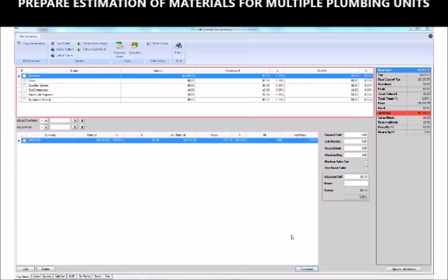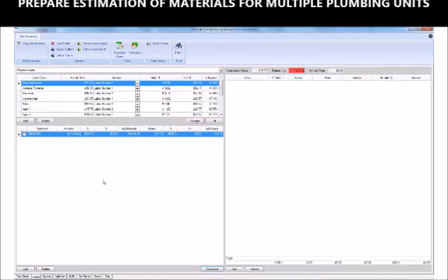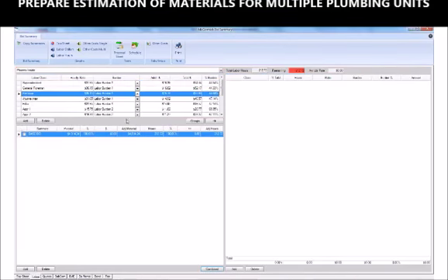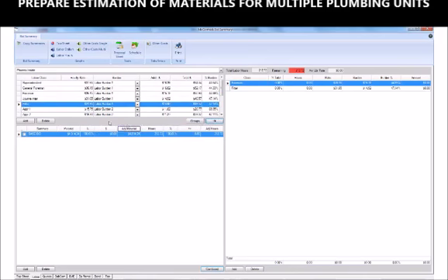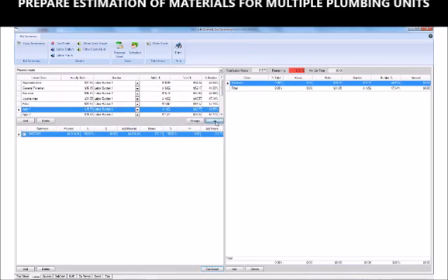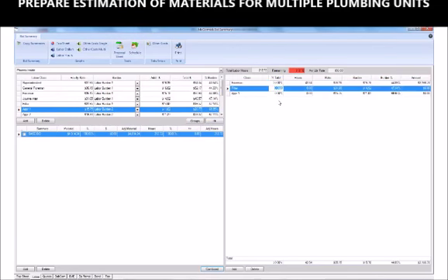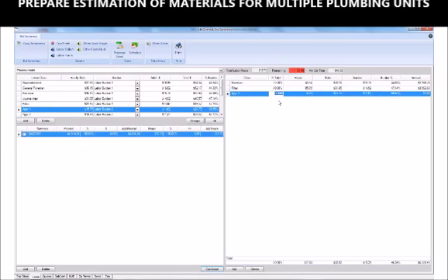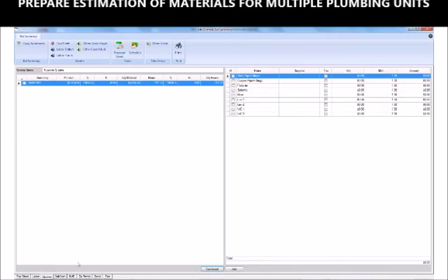The bid summary is an easy place for us to finish up the bid. We have our total material cost here, and we're now going to add our labor to our man-hours. Keep all of your workers' rates in the system and simply add them to the job, or bid with a composite rate. In this example, I'm going to give 20% of the hours to the foreman, 40% to the fitter, and the other 40% to the apprentice. All hours have been assigned, giving you total labor dollars.